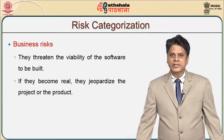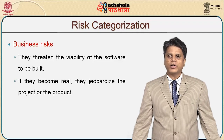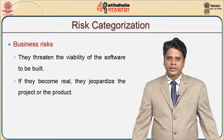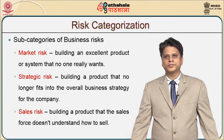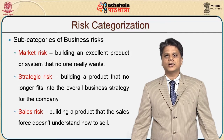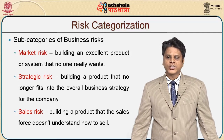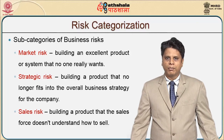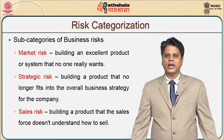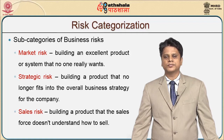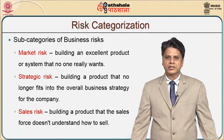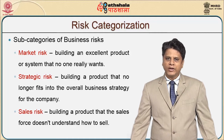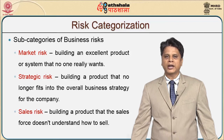The third category is business risk, wherein we are threatened because of the viability of the software we are about to build. If this becomes real, it jeopardizes the project or the product. Within business risk, we have various subcategories. One is market risk — if we build an excellent product or system that the customer does not really want, then it becomes a market risk. We do not understand the strategy behind why we need to market this product.